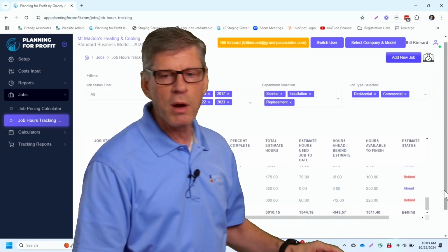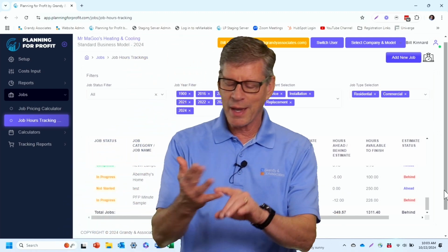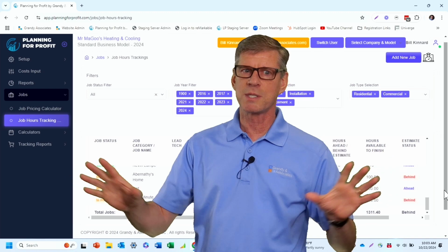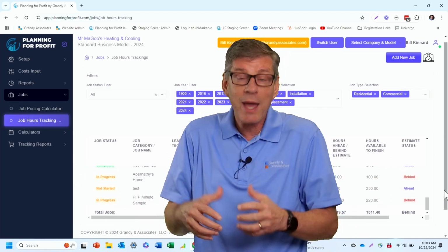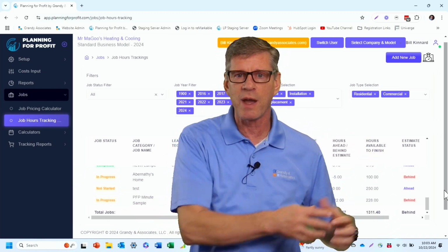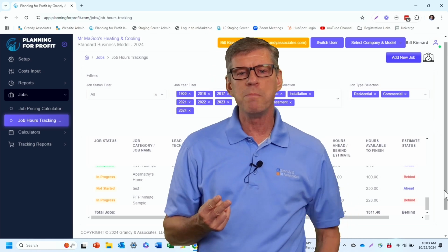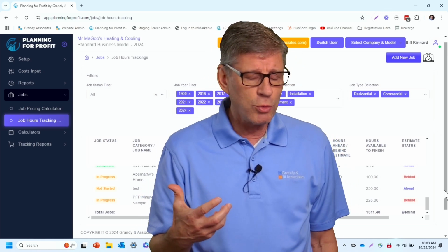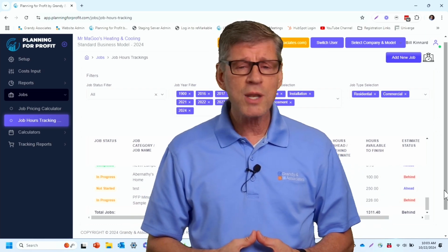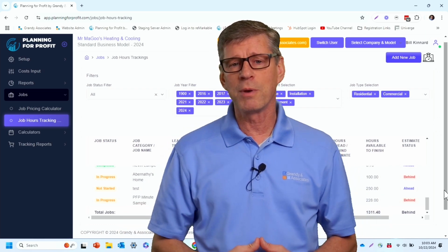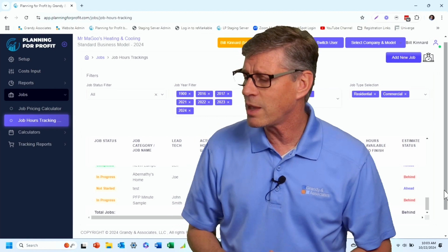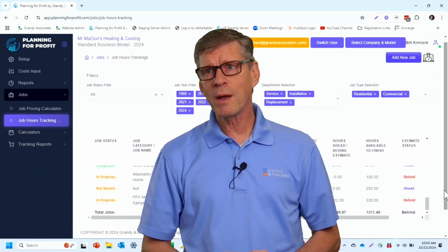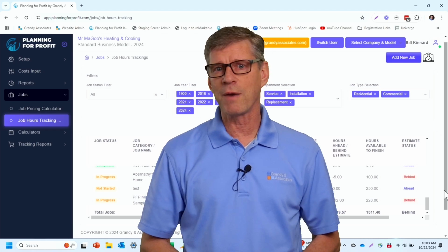When they see that we're over, they're going to go, okay, I don't know who bid this job. I don't know what they were smoking when they bid it, but they totally missed it on the bid. That'll be one. And that could be the case, right? We need to go back and refine our bids. The second thing would be, yeah, but if we look at this job, we didn't know we were going to have to get into a number of these items that were in there. And so, you just didn't fill us in properly. Now, that's a communication issue inside the office. We need to fix that one.